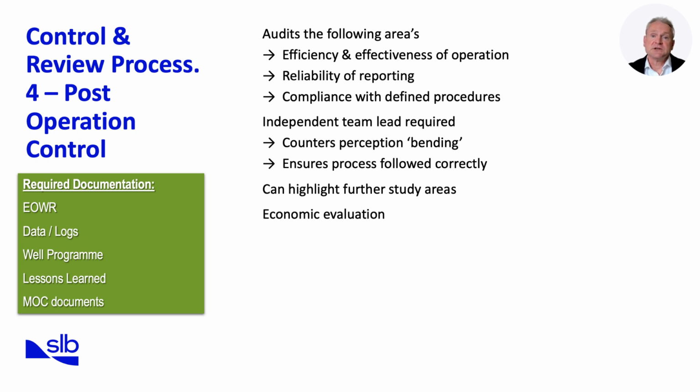Required documentation includes the end of well report, all rig data and logs, the original well program, lessons learned, and any management of change documents. Together, these ensure the review has a full picture of both planning and execution. Post-operation control closes the loop on a project, creating a reliable foundation for continuous improvement. With that framework in place, we now move toward linking control and evaluation directly into updated designs.